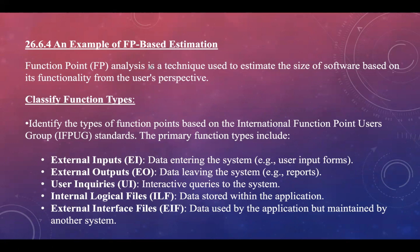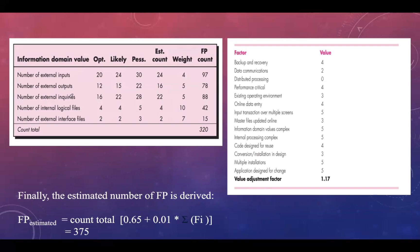Moving on to FP-based estimation. Function point analysis is a technique used to estimate the size of software based on functionality from the user's perspective. We classify function types such as external inputs, external outputs, user inquiries, internal logical files, and external interface files. Values are assigned to each parameter, and assuming the final calculated value is 320 function points after applying the 14 complexity adjustment factors, we use the standard count-total formula for function point estimation.